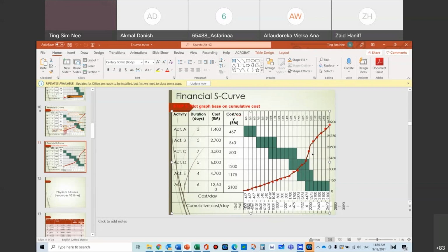The other way is, as you go along, you get rid of this PV and take your own PV, and then you punch in what the client pays you. They pay you, maybe in 3 months, one time, and then another 3 months, one time. So the curve of them paying you will be like a step curve. They pay you, then stop for a few months, then pay you again, stop for a few months, pay you again.